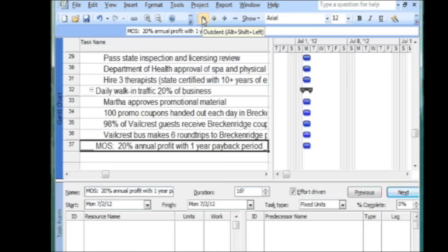With our WBS complete, let's go over a couple of key concepts. You may be asking yourself, what's with all this indenting and outdenting? Well, we're doing that to create summary tasks. Looking at the WBS, we have summary tasks, which are our high-level achievements, and they're in bold because we indented something underneath them.